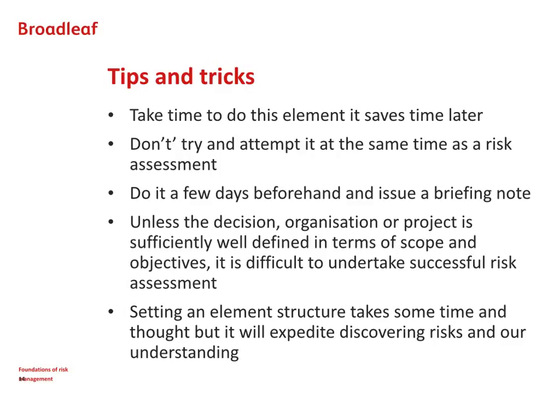Particularly, don't try and do this at the same time as you're having a discussion of risk in a risk assessment workshop. Do it several days beforehand and group all these tables together, we've discussed here these templates, into some sort of briefing note. Send that to the attendees of the discussion a few days before the discussion takes place so that they can consider the matters and be prepared.